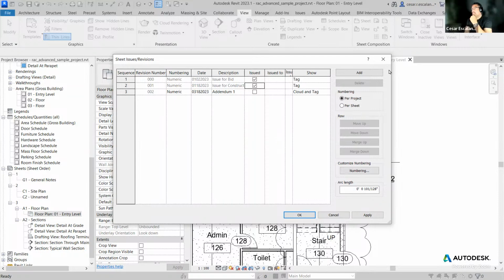And then when the next one comes, my recommendation is, don't build all your sequence numbers from the very beginning. In construction it's hard to anticipate the need for RFIs and modifications in the contract, but you add them as needed for the project. And then right after you print, issue them to lock them in place and go to the next one.